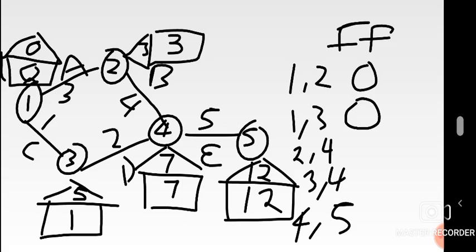Which of those is the ending? In the first scenario, it's 2. Earliest start time of ending node, you look at that one. On 2 there was 3. Then minus earliest start time on starting node, there was 0 there, right? Okay, so it's 3 minus 0, 3.